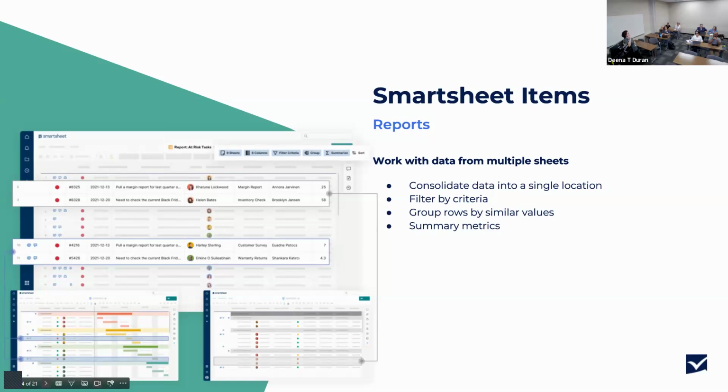I don't want it to say that. That way now it's not including any templates, and it's not including any new projects that are just getting started, because sometimes the project managers are like, oh yeah, we're starting this project. They'll create the folder, they change the name of the folder, but not the sheets within it because they haven't actually gotten into the details yet. Things are still working out.